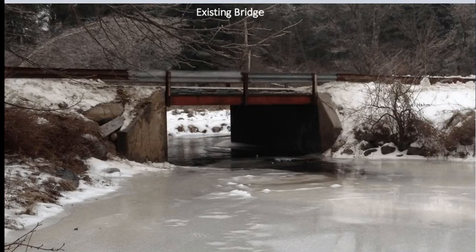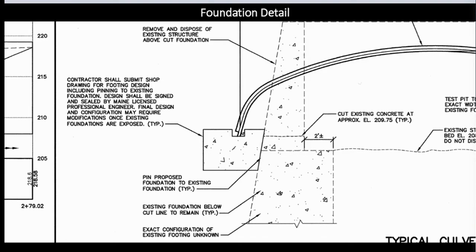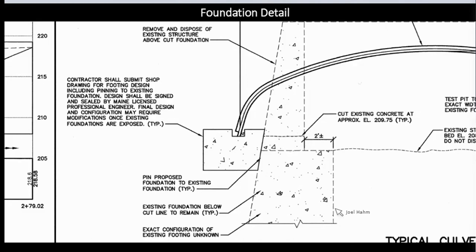The stream actually runs parallel to the road and crosses underneath it in sort of an S-curve. This was originally specified as an aluminum box culvert structure, but they opted to go with the deep corrugated steel structure, mainly for cost and because it would be quicker to install without any ribs. The footings were designed to tie into the existing bridge abutments, which were cut off at about the footing elevation. That was really nice because the remaining abutments helped with scour control and allowed them to pile riprap against the structure to help with high flows. They basically reused the existing foundations for the new bridge.